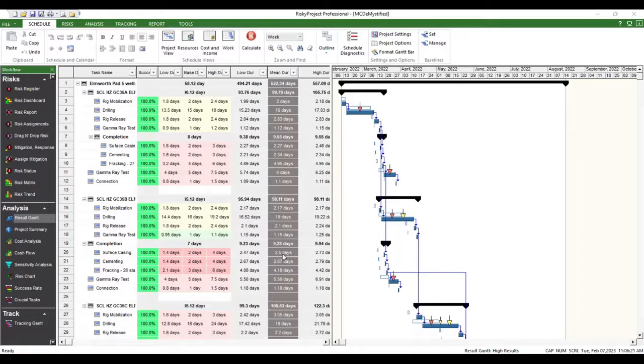If you find that you can go in and do some experimentation and say, well, we ran 1,000, and then when we ran 2,000, we suddenly saw that our P80 cost changed significantly, then when we have these types of risks, we probably need to make sure that we run a higher number of iterations.